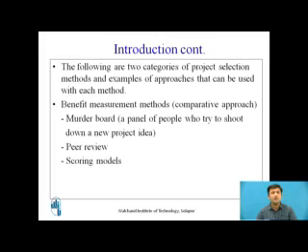Then the third method is called scoring models. Let us say in this, we see 1, 2, 3, 4, 5 projects being considered, and under different parameters these projects are scored. They can be scored on the basis of delivery, on the basis of cost incurred or the amount of investment incurred, on the basis of benefit received or profit received.